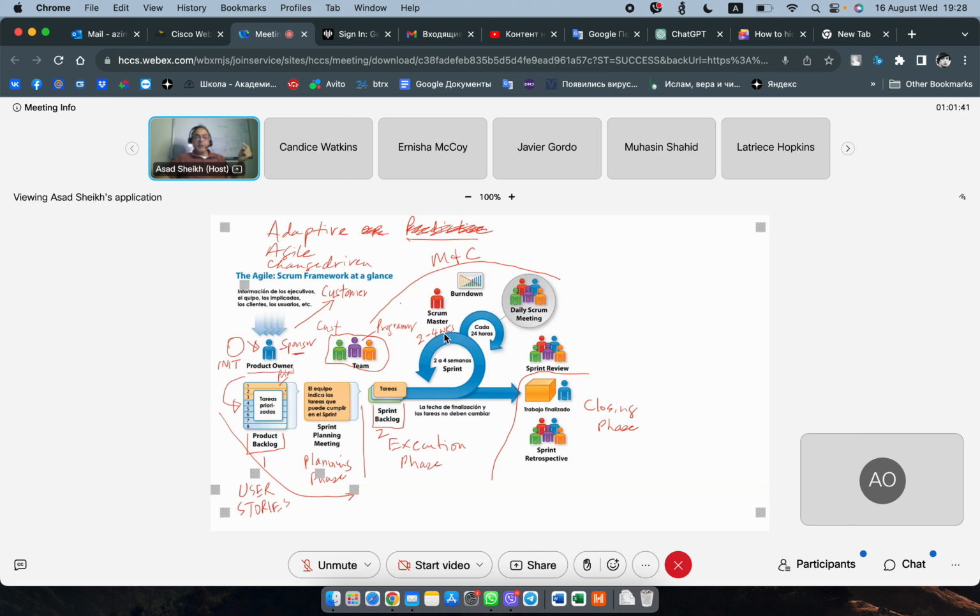They're going to play some poker to estimate, and we'll talk about this when we do the second version of the Agile process. I want you to learn the Agile process at this level first before we get into this poker business. But basically, it's a method by which you estimate. So this team is going to work with the sponsor and the customer in this sprint planning meeting to figure out how much work they can take on during 2 to 4 weeks.